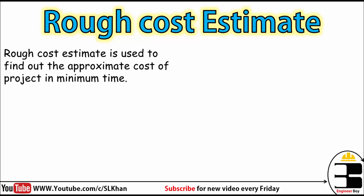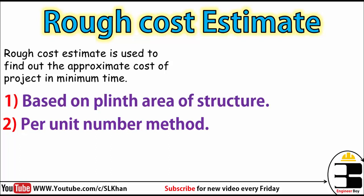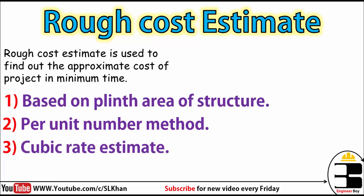How exactly do we do the rough cost estimate? There are a few methods: the per unit number method, based on length/area of structure, based on cubic rate estimate, and others. These methods can all be used to do the rough cost estimate of any project. Let's select the one method used most by quantity surveyors in daily projects.